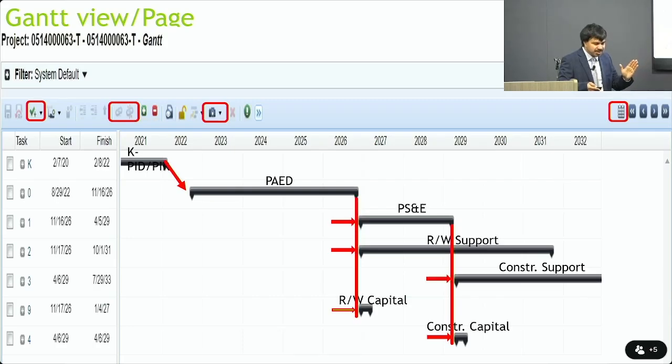But as people charge, as we know, we're not perfect. Some people might charge even though the phase is completed. Your milestone shows it's done today, but there might be some people charging a month down the road. That throws off these bars for the ongoing projects.